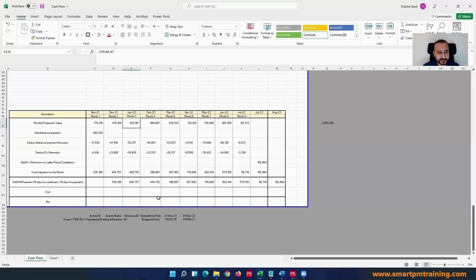And you can write it there. And you cannot just, some people will say that I have a profit margin of 20% in the project, so the cost is 80% of this value. But in real life, to be honest, it doesn't work like that. The contractors can really have different rates. It doesn't have to comply with cost plus overhead plus profit equals the price. It doesn't have to be like that all the time.